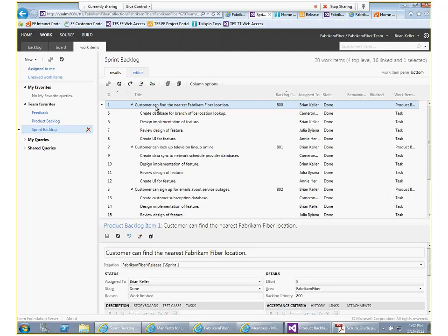So we're talking about the INVEST acronym. And the V stands for... I forgot what the V is for right now, and I had this at the tip of my tongue just a few minutes ago. Let's go for the E, and then I'll come back to the V. The E is estimable, right? It's got to be something that's estimable. The S stands for small, meaning something that's got to be able to be done within a sprint so that I'm able to deliver the full increment.